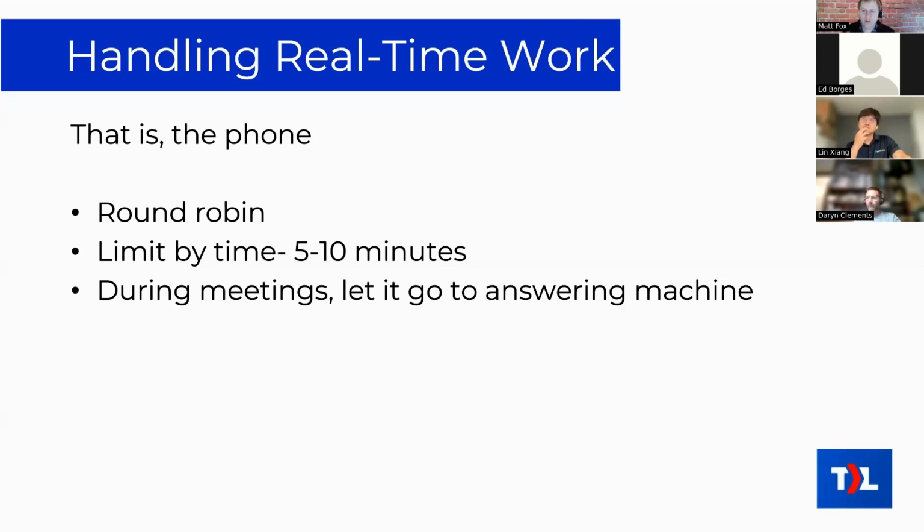What I'm telling you here is if you do take phone calls, but you want to minimize it because they are an interruption, and we're talking about really working efficiently, meaning we don't want to have too many special cases here. We want to try to get everybody into our one stream of work, whether we found out about a problem by email or by phone or whatever. Let's try to keep it fairly simple. So some techniques to manage the phone without it interrupting stuff too much is to have a round robin method of dispatching those phone calls to somebody.